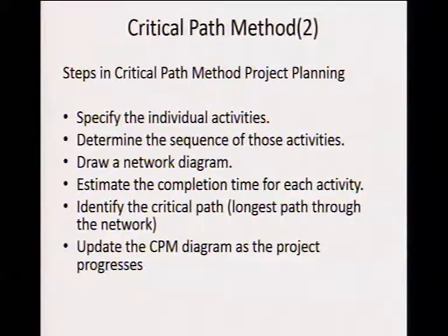Then the third step, once you know the sequence of the activities, you need to draw a diagram, which is very helpful for most organizations. And once you've got the diagram, then you have to have an estimate. And this is where you bring in the cost and the budget of the activity, and then it also needs to be scheduled: when are you going to finish the specific activity and how much will it cost. And then, of course, which is very important, as the project is progressing, it's very important to update your diagram from time to time as the project is going.